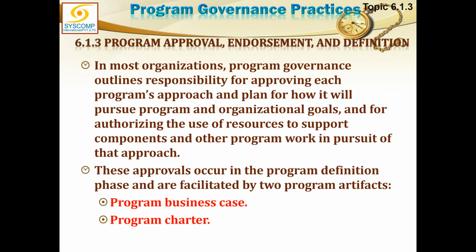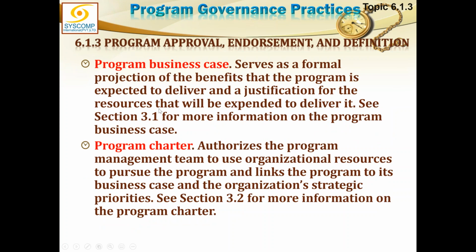So these two artifacts are going to be the input for all subsequent documentation. Business case, as we already understand, is a formal projection of the benefits that the program is expected to deliver and a justification for the resources that will be expended to deliver it. Charter, this authorizes the program management team to use organizational resources to pursue the program and links the program to its business case and the organizational strategic priorities. So this we have already talked about.